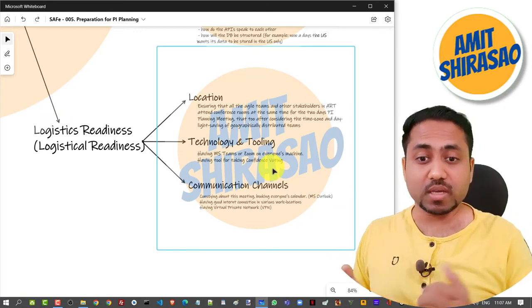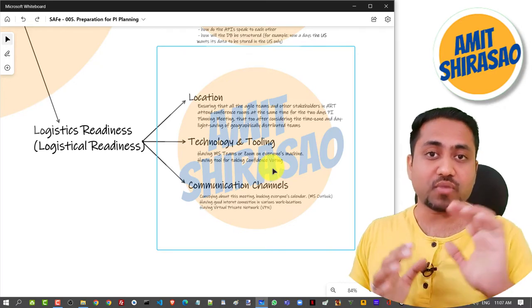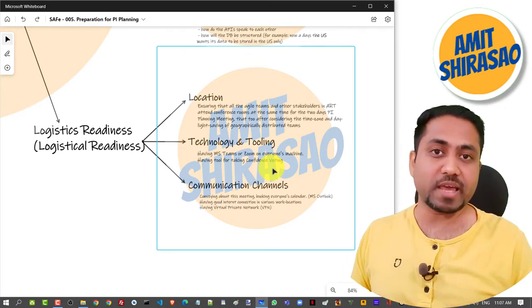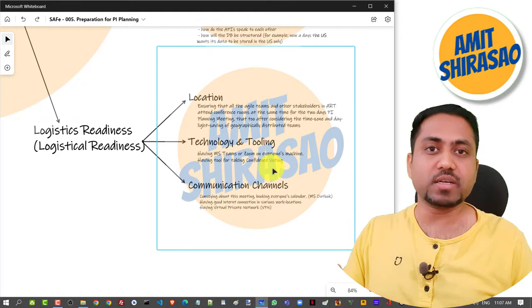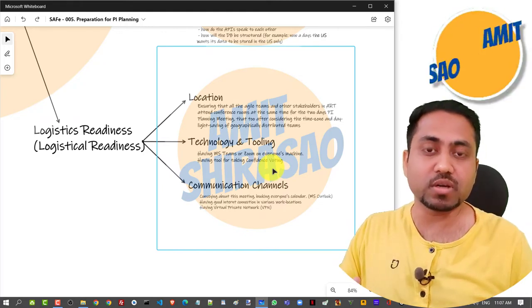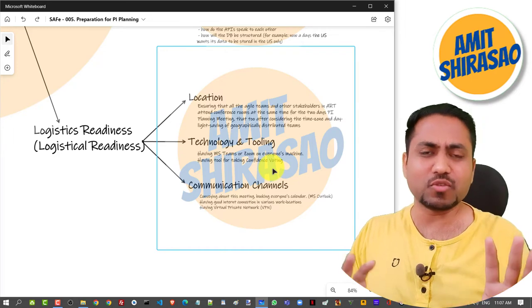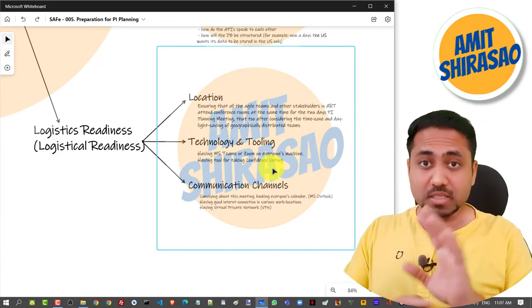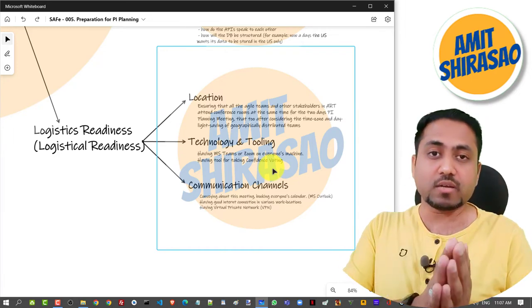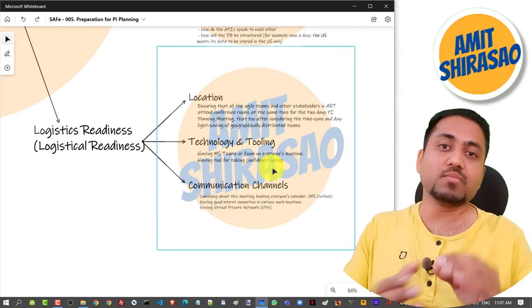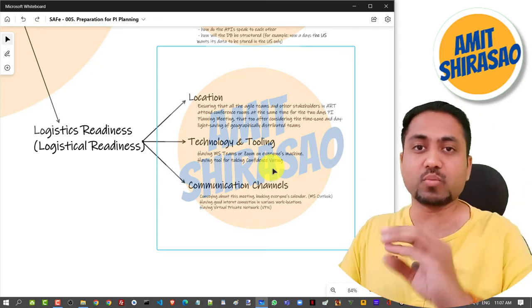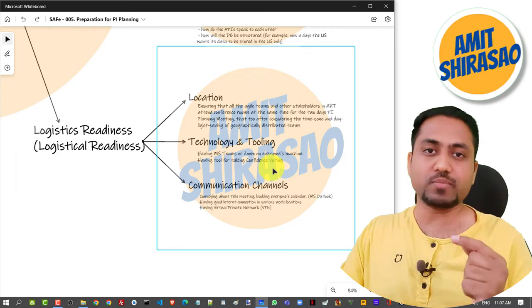All of you tell me, out of 5, how much will you rate this plan? If I say 5, then I am 100% sure that this plan is going to work. If I say 1, that means I am not at all sure that it is going to work. I am very doubtful. This way, the overall average vote should come above 3. Then and only then is your planning successful. Otherwise, you go for a replanning.